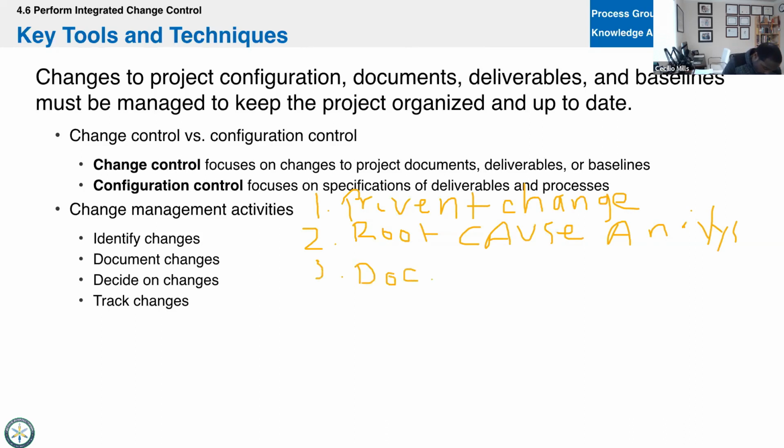Okay. Step 3, document the impacts. All right, step 3, you need to document the impacts. For PMI, the impact is going to be what's going to happen to the scope, schedule, budget, or risk. Many times on the exam, they'll give you 2. You only need 1. One of those 4, and now you know that we've documented the impact. 4th thing you need to do, issue the change request.